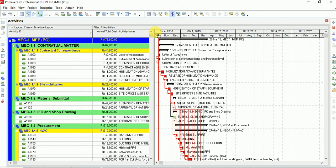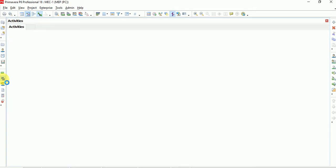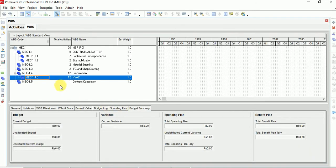I'm also going to show you the WBS of this project. As you can see, this is the WBS — these are the work packages, and these work packages combined together will complete this project. In Primavera you can also manage many projects at once: an enterprise can have many projects combined together into a program.